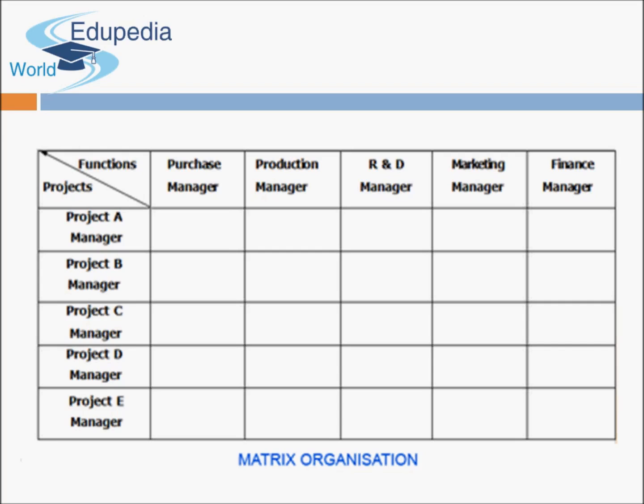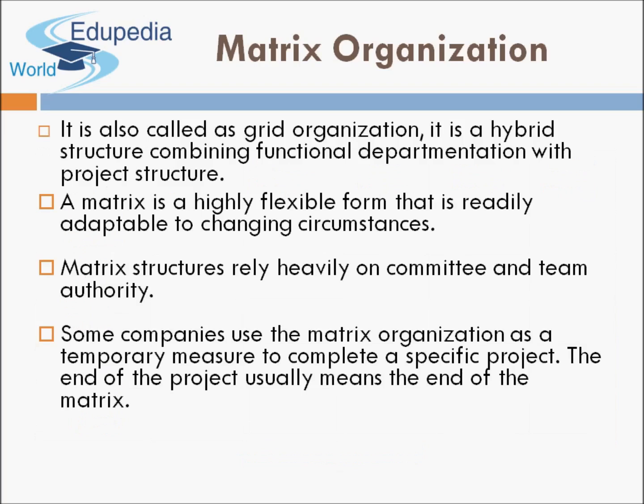These individuals from different departments working together under one project report to the project manager as well as to their respective functional heads. Once the project is completed, these people go back to their functional departments. It is called a matrix structure because a grid or matrix is formed where people report to both project and functional heads. Key points: it is also called a grid organization; it is a hybrid structure combining functional and project structures; it is highly flexible and adaptable to changing circumstances; matrix structures rely heavily on committee and team authority. Some companies use it as a temporary measure — when the project ends, the matrix ends.